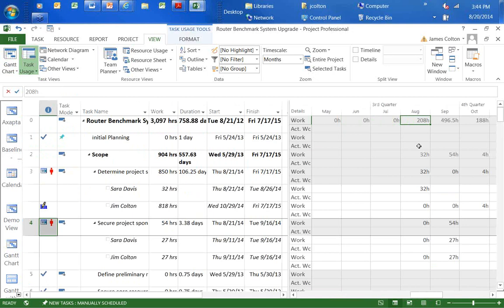And this is one of the fundamental reasons, again, that projects are not accurate. Because the work that's been planned for the past did not occur. The activities and tasks did not get completed. But we're still showing dates that are now, you know, invalid.